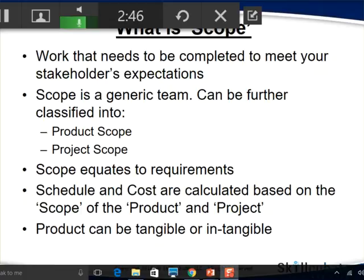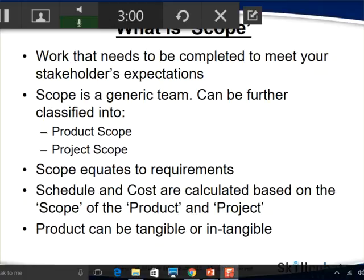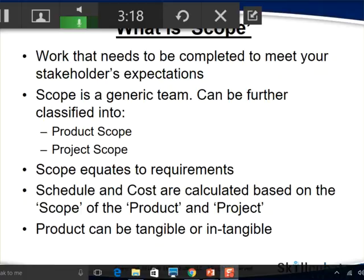Even though both are equally important, the product scope will be very important especially from the requirements perspective, because the product scope equates to all the system features and functionalities it must support. Both the product scope and project scope will be taken into consideration when the project manager comes up with cost estimates and the schedule — that is, how long the project will take to complete.